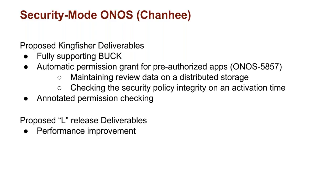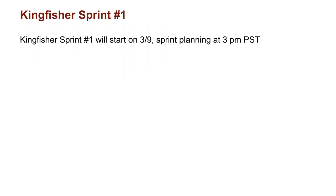For security mode ONOS in Kingfisher, deliverables include fully supporting OSGi, automatic granting of permissions for pre-authorized apps, and annotated permission checking. In the L release, the focus will be on performance improvement. Kingfisher Sprint 1 starts this Thursday with the sprint planning session at 3 p.m. The sprints have already been added to JIRA so you can go in and add the stories you plan to work on. For those needing additional sprints created for their brigade, please ping the organizer to get those added.